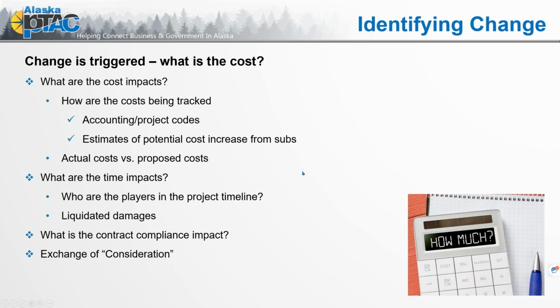This is where having that accounting process, where you're tracking those direct costs for work completion, and now a subset process for tracking the cost of change, makes it easier to compare from our proposed change. Here's our actual. We're tracking that cost against what we had proposed.